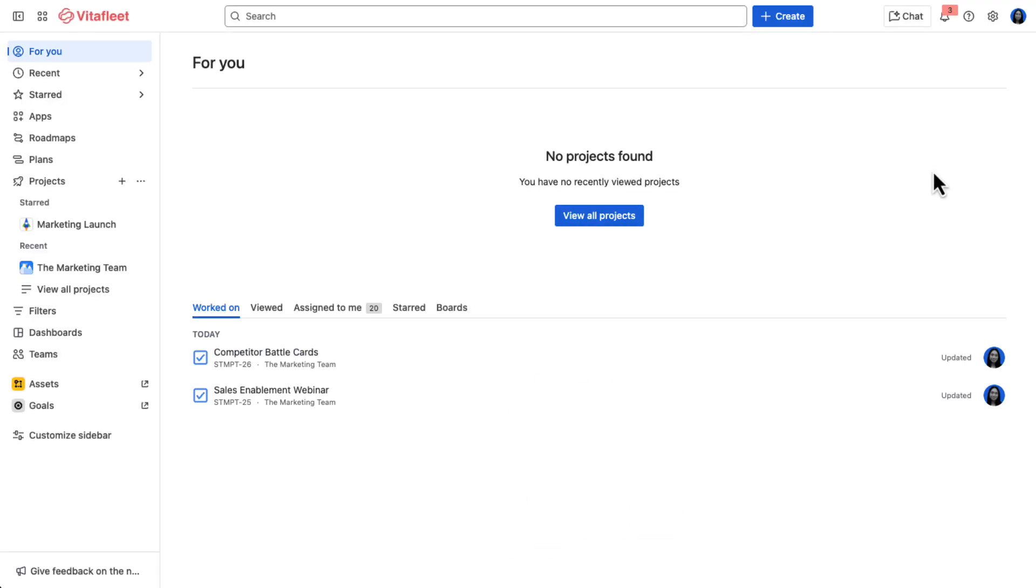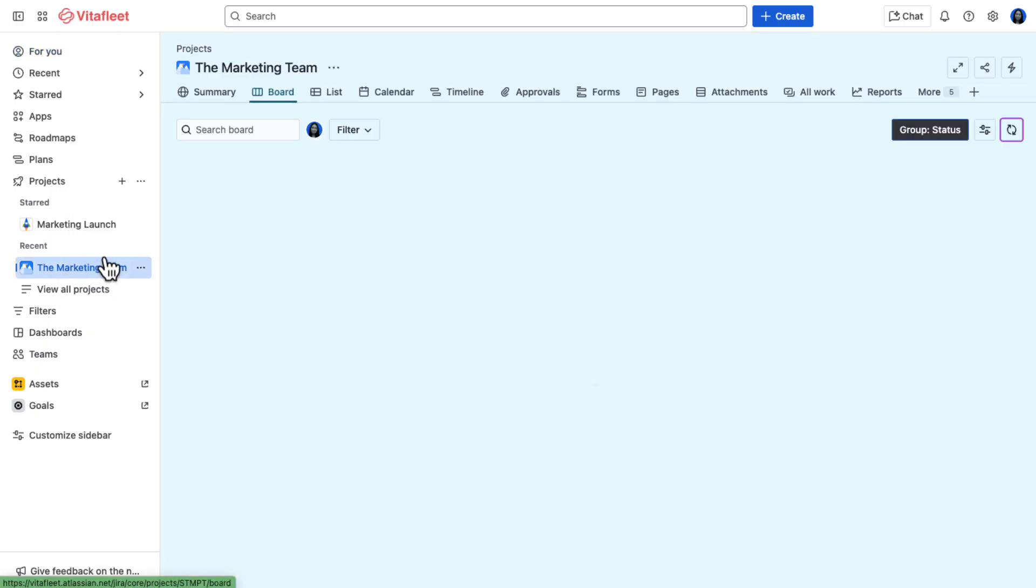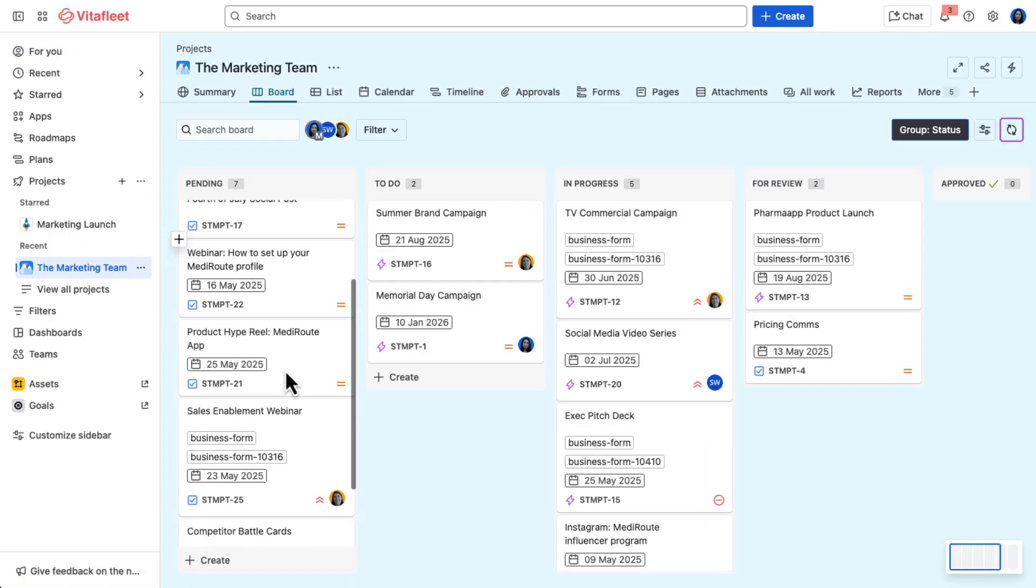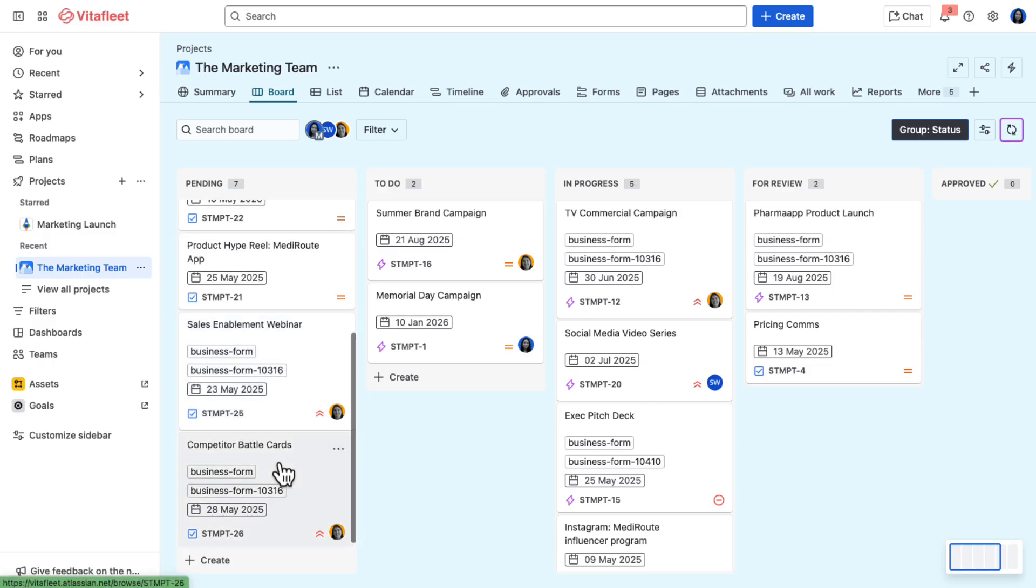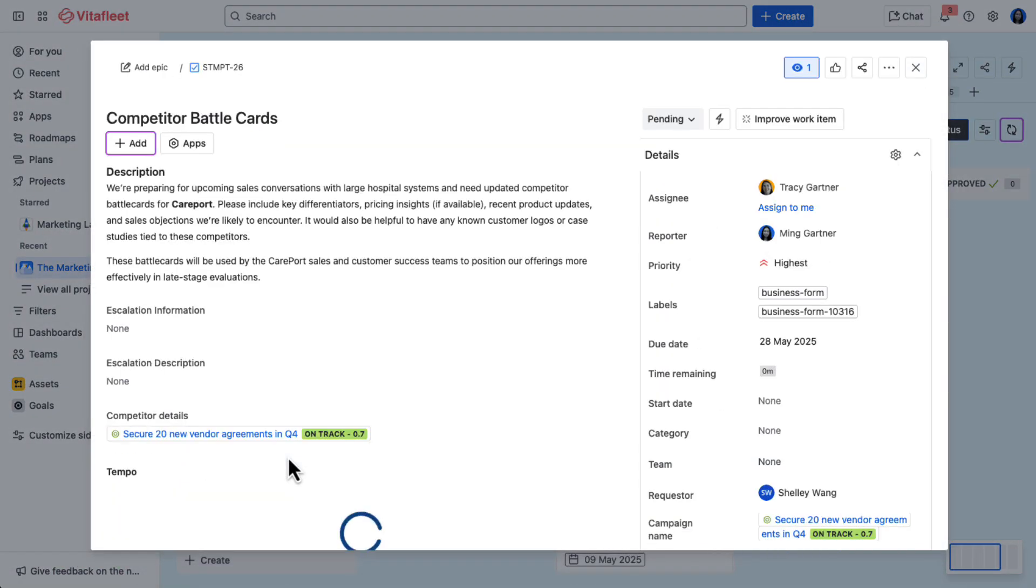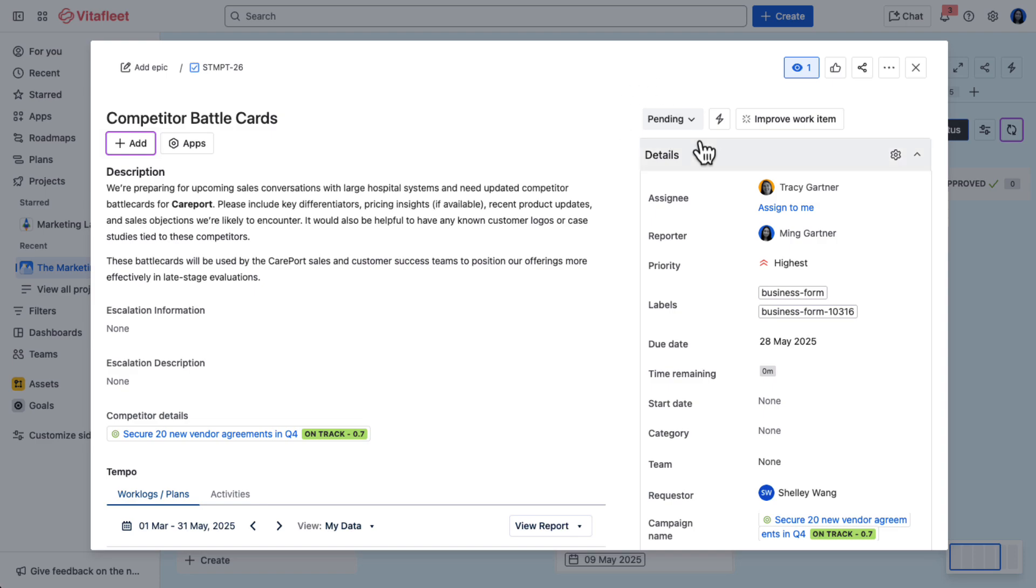Once submitted, the form automatically creates a work item on the marketing request intake board and places it in pending. With the newly created work item, Ming can track the status of her request and collaborate with the marketing team, all in one place.